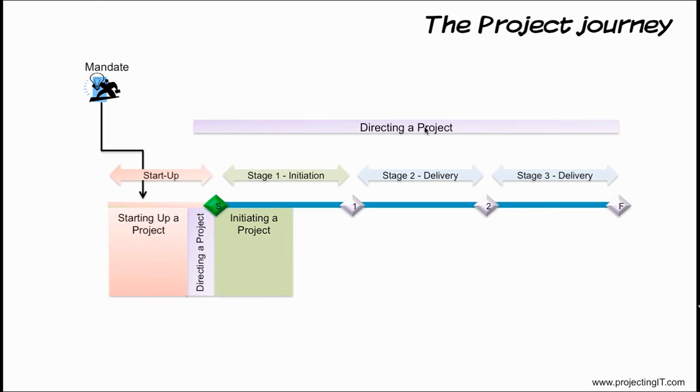When the project manager is ready with the PID and the benefits review plan, the project manager starts planning for the next stage. PRINCE2 recommends manage by stages. So we have a project plan which provides a high-level roadmap, shows us the number of stages and the start date and end date of each stage, apart from the overall budgets and high-level scope. Whereas the stage level plans tell us what's happening immediately next, which teams, and the details about each stage.